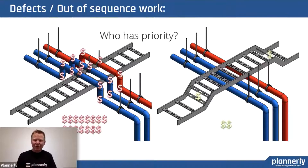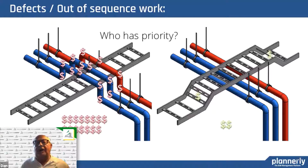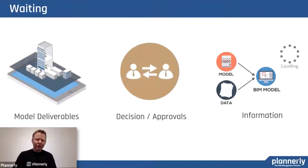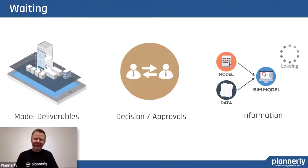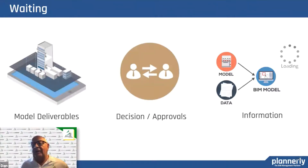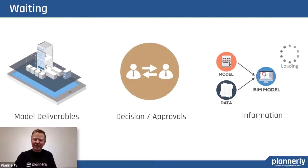There's a great example here: we've got one solution on the left costing more money, but they both solve the problem. It requires good planning to know what you're looking for and when. Another waste is waiting — if you've got a large model loading time on poor hardware, that's waste. If you're waiting for deliverables in order to do your work, that can also be waste. Waiting for decisions is a key issue: people making decisions were not part of the planning process, so they didn't realize how much they can mess up your design schedule by not making timely decisions.